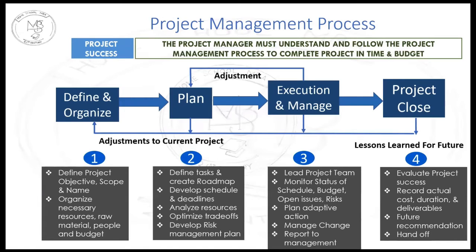So we will have to adjust our phases. Maybe the first phase you could not complete within the stipulated period of time, so you extend the remaining part of the first phase into the second phase, and you complete the second phase and the remaining part of the first phase together. That is what we mean by adjustment of time, etc.